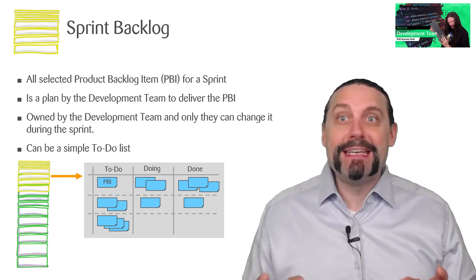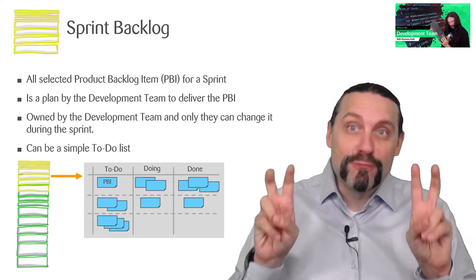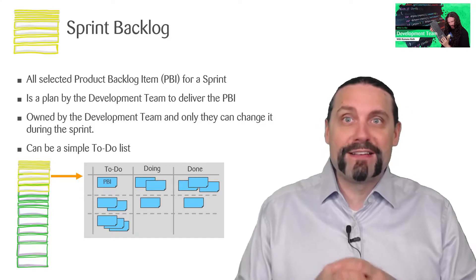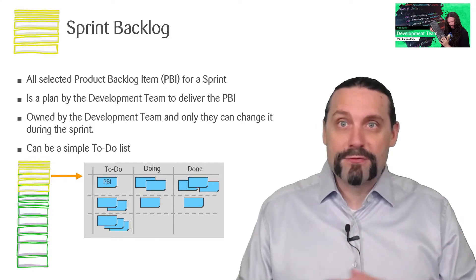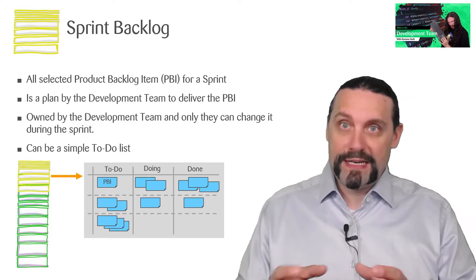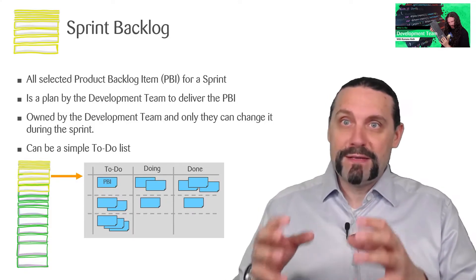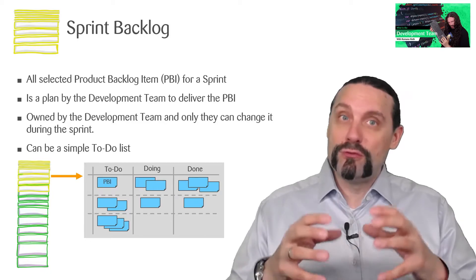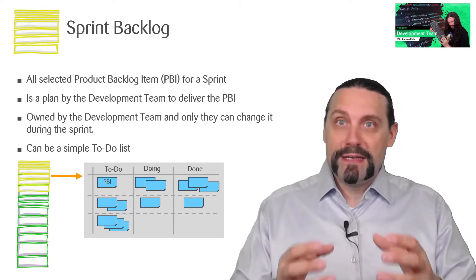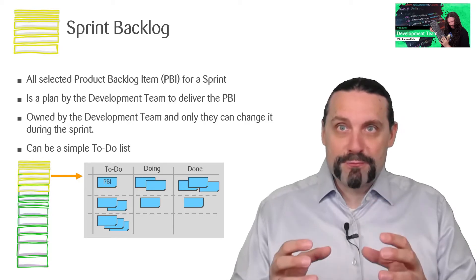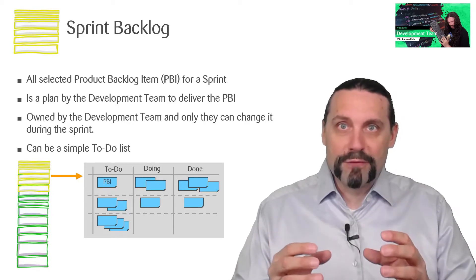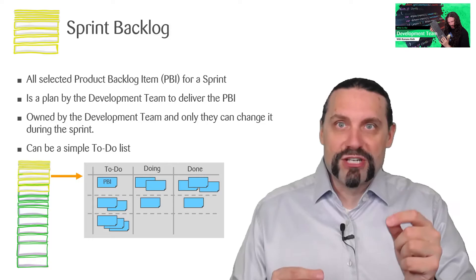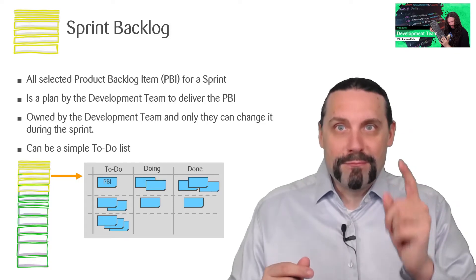I can already hear the whining and crying of the wannabe product owners out there, which are basically nothing else than project managers. Yes, it's true. If you want to be truly agile, then the development team needs to own the sprint backlog, and only they can change it together with you as a product owner if needed. But the sprint backlog is a plan of the development team to deliver the selected product backlog items which have been prioritized by the product owner.